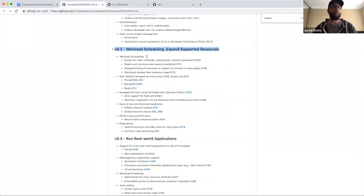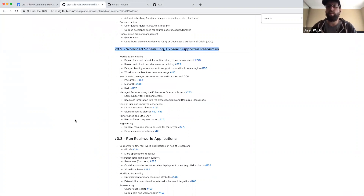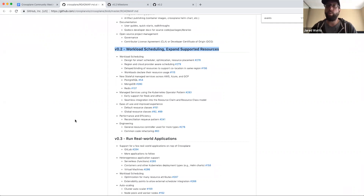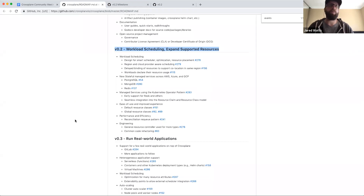We are towards the end of the 0.2 milestone. The first release of Crossplane when the repo went public was right before KubeCon Seattle, around the beginning of December. In 2019 we're targeting a quarterly release cadence: a 0.2 release sometime later this month in March, and a 0.3 release around June, around KubeCon Barcelona.